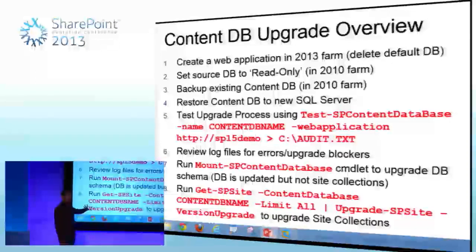As part of your planning process, you want to give the power to the site collection administrators so that they can prioritize how they upgrade their site collections based on training and all the rest of it. So you can get your upgrades done, and people are still using 2010 features, but in order to get the 2013 features and your users trained, you can then start doing the upgrades per site collection.